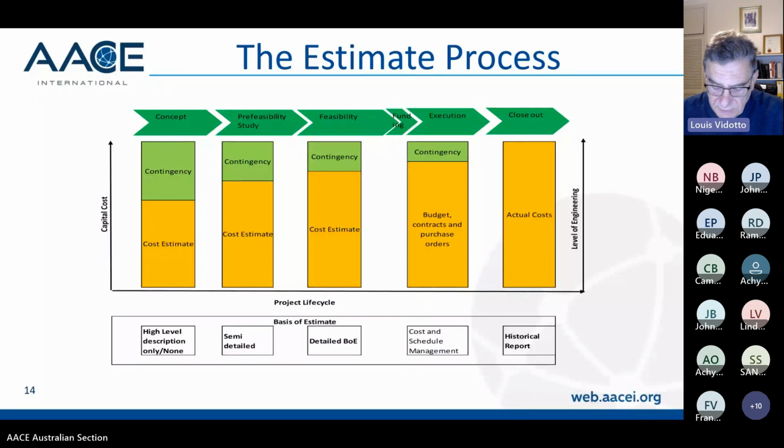I know that many companies now are starting to realise the value of that. As a project controls professional, it's important to try and get involved in the contract and purchase order formation stage to set up the pay items so that you can actually align actual costs back to your budget items, and start to get that real correlation back to how your estimate was built. That's a bit that I find as a project controls person is probably weak in a lot of companies, that the contracts and purchase order line items are done by the procurement folk, with sometimes little or no input from the cost engineers. So that's something that I certainly try and promote.